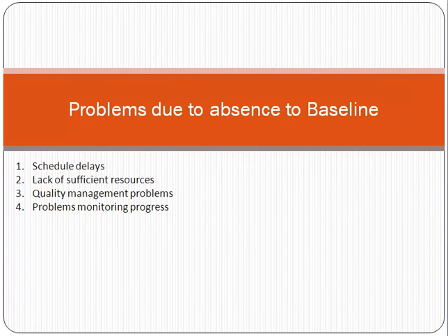Friend, it is very necessary that the baseline should be there for scope, cost, and schedule. If you don't have those baselines in place, remember, we cannot monitor the progress of a project. Because monitoring means we should be able to compare with the plan.